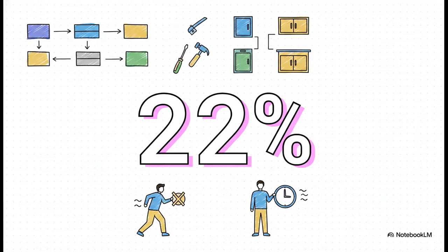It even scales down to the micro level. In highly specialized tasks, like an on-site kitchen cabinet assembly, adapting VSM yielded a 22% increase in pure value-adding time. When you eliminate all that motion waste, workers walking back and forth to get tools or waiting for another crew to finish, your skilled labor actually spends their day building value.